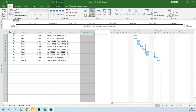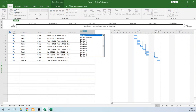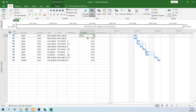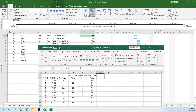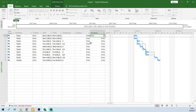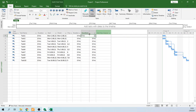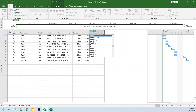In order to define these durations, click the arrow to add a new column and type 'Duration'. I have to add 5 columns — one for optimistic time, one for most likely time, one for pessimistic time, one for expected time, and one for standard deviation. So we add Duration 1, Duration 2, and Duration 3.